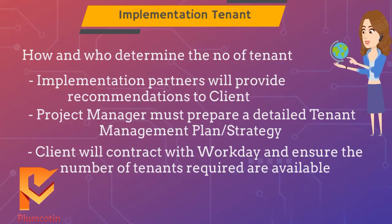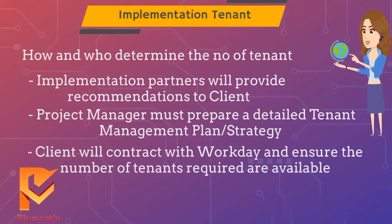Your project manager must prepare a detailed tenant management plan strategy that outlines the purpose and activities of each tenant at each stage of the deployment, and how you are going to use proxy to assist with the testing activities, which third-party system environments will be required during the deployment for testing at each stage. Client will contract with Workday and ensure the number of tenants required are available during the course of the program.